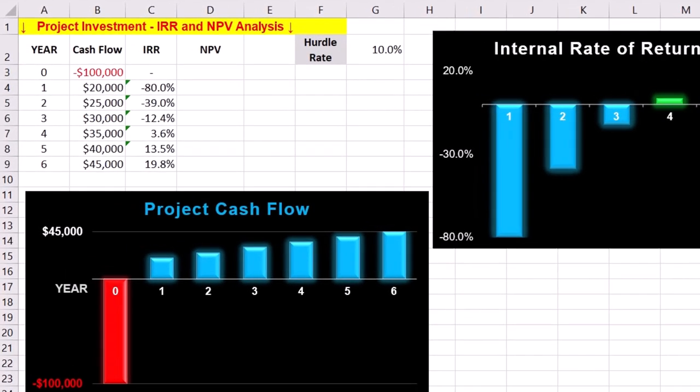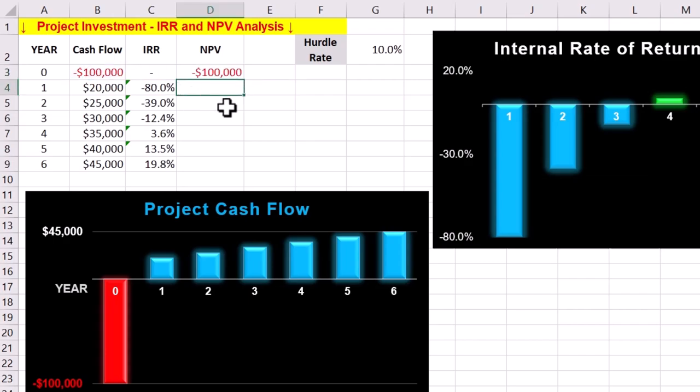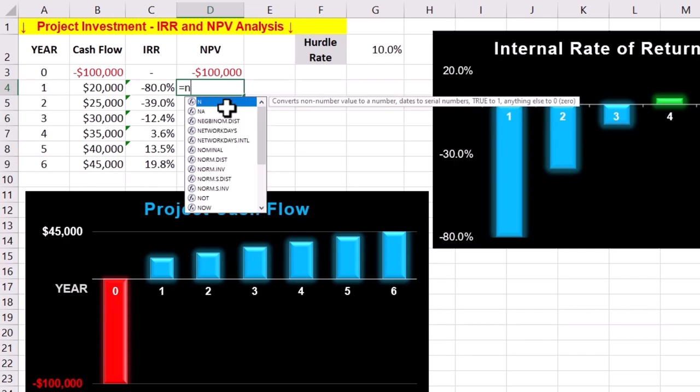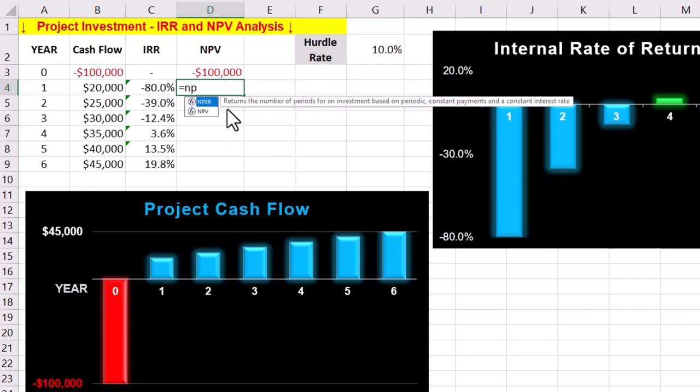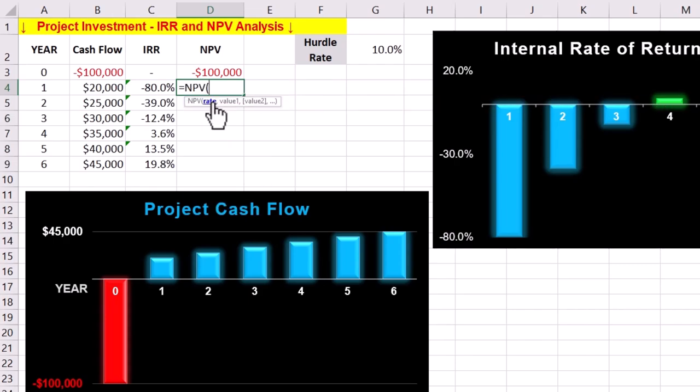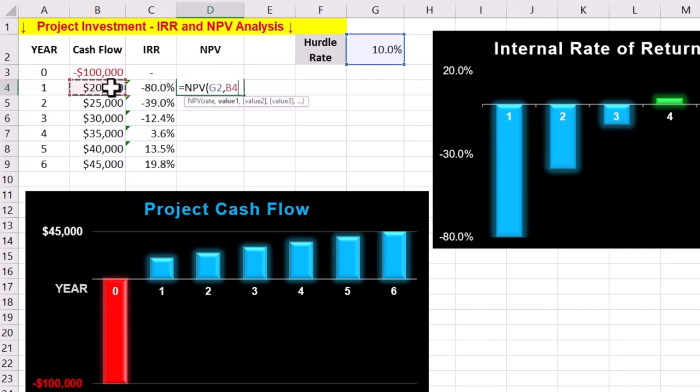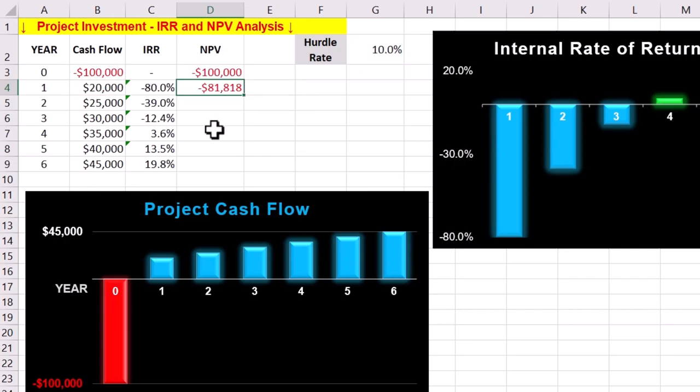NPV is the sum of all future cash flows discounted to the present value. NPV at year 0 is simply the initial investment of minus $100,000, because no time has passed and therefore no discounting. For year 1, enter the NPV formula in Excel. The discount rate of 10% is the first parameter, followed by the cash flow in year 1. Then we add the initial investment to find the NPV of minus $81,818 by the end of year 1. For future years, we can replicate the process.